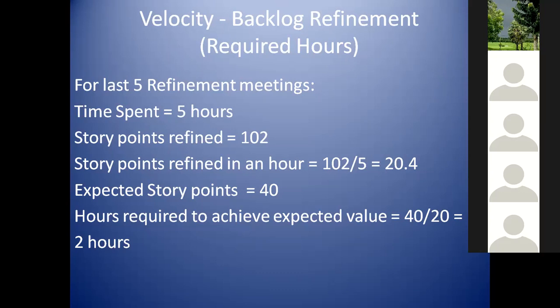In this way, you will have the information on how many hours you need to plan in the refinement. Okay, what is the benefit of this? There is a benefit. When you are planning your sprint and you send the sprint planning report, you will be sending the committed story points from your team. Always give a hint how many hours you are going to spend for your product backlog refinement.